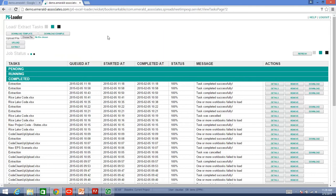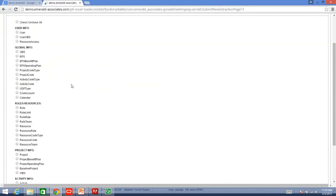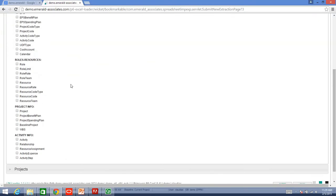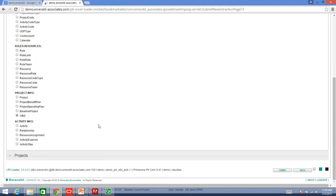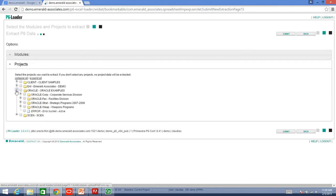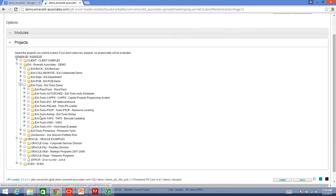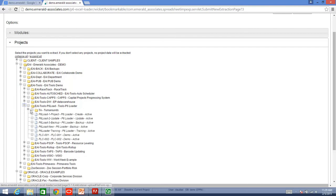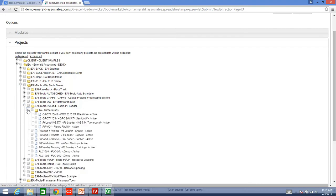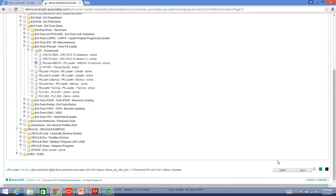What I want to do is, first of all, extract my WBS from the project that I already showed you. I am just going to say extract. It is asking me which modules I want. I will say the WBS, and then I will go and select my project.